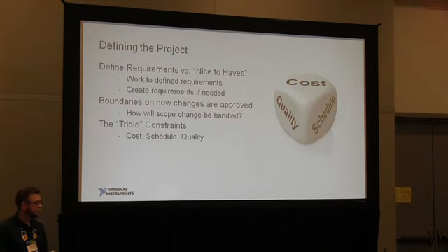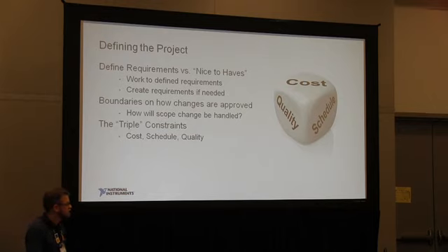So many times an engineer or a manager that you're working with will say, oh, I approve that. Yes, go ahead and implement that. But it's purchasing that has to sign off on it. They're the ones that authorize payment, especially with a fixed price business arrangement for a project.